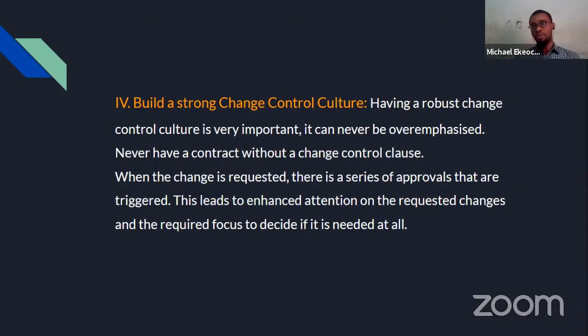So in project management, there is what is called a change request form. When the client makes a request for a change, there are certain details you need to put into that form, like what the change is, the time it is coming, the effect it is going to have on the project, and if it is important at all. That's when you've done your proper assessment, you determine if this change is necessary to implement at that point in time.